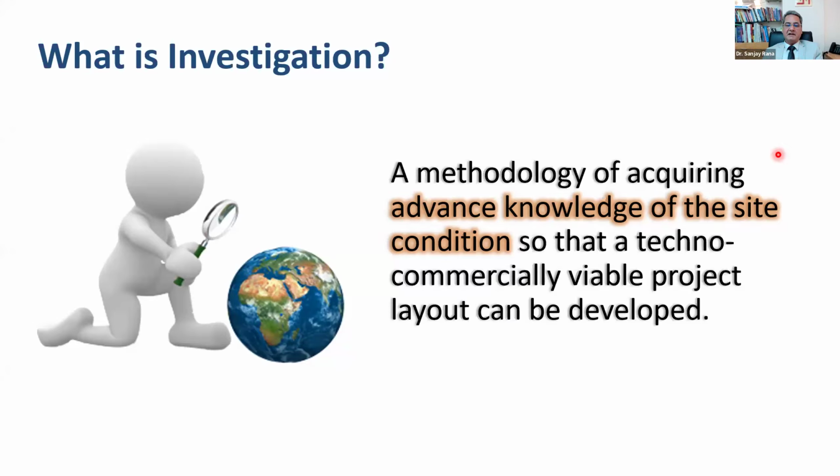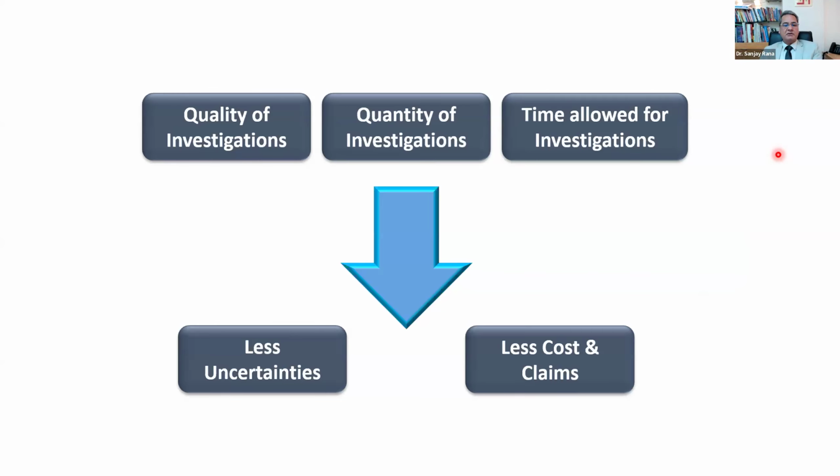Take any project across the world, look at how much money has been spent on investigation, compare that with the cost overrun, and you will always find they are inversely proportional. That is, the more money you spend on investigation, the lesser are your costs and claims and delays, etc.